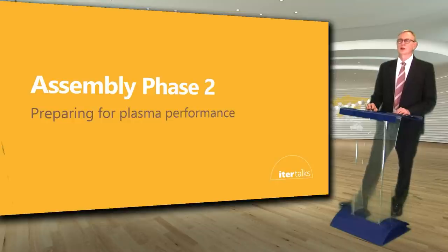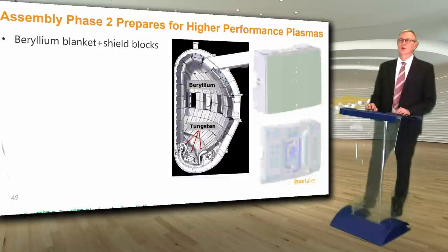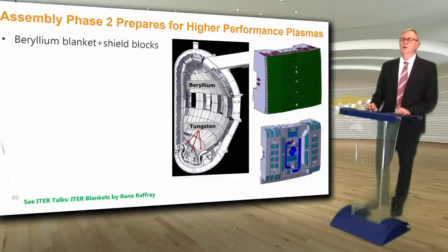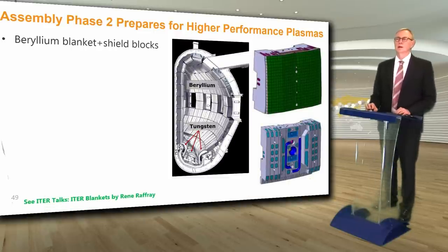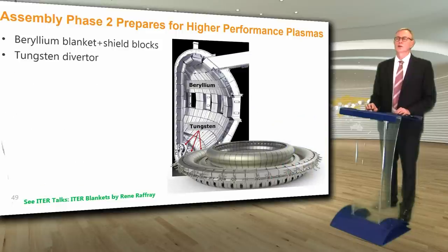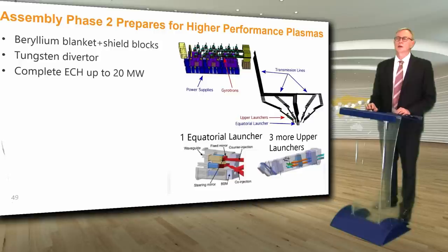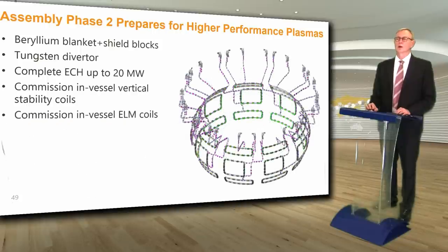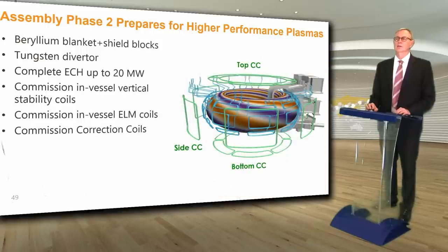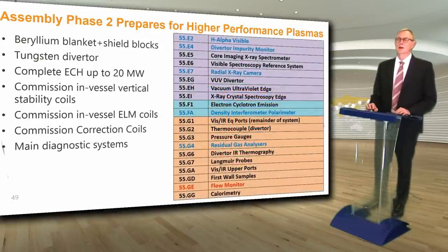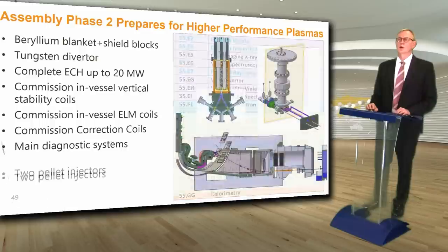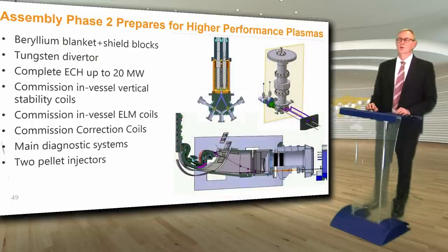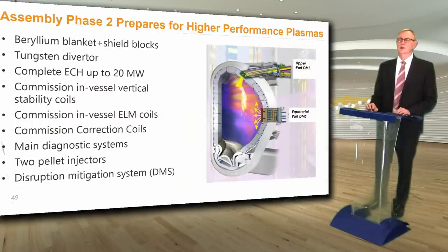Next will be assembly phase two to prepare for plasma performance. The main additional components include the beryllium blanket and shield blocks, the tungsten diverter cassettes, the complete ECH system up to 20 megawatts, commissioning of the in-vessel vertical stability coils, the edge localized mode (ELM) control coils, and the external correction coils. The main diagnostic systems will also be installed, as well as two pellet injectors for fueling and for controlling edge localized modes with frozen hydrogen pellets, and the disruption mitigation system.